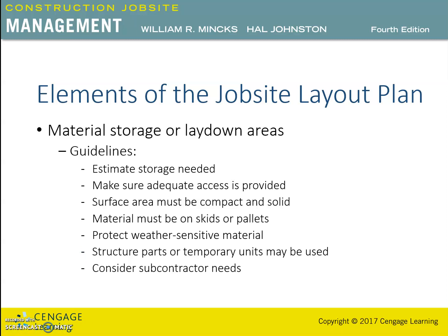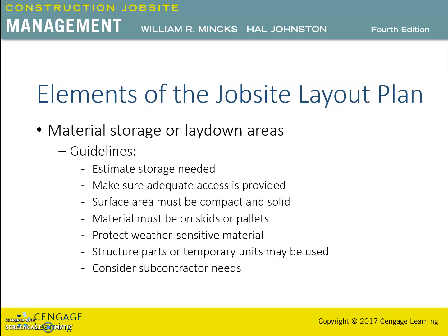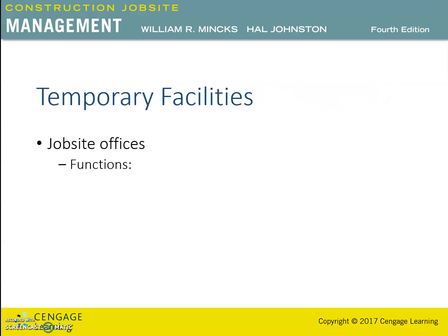Temporary storage units are often used on the job site. These include mobile home type trailers designed for storage, 40-foot transit vans, containerized storage units, and job built storage buildings. When determining the material storage on the job site, always consider the needs of the subcontractors, as the majority of the material is supplied by them.